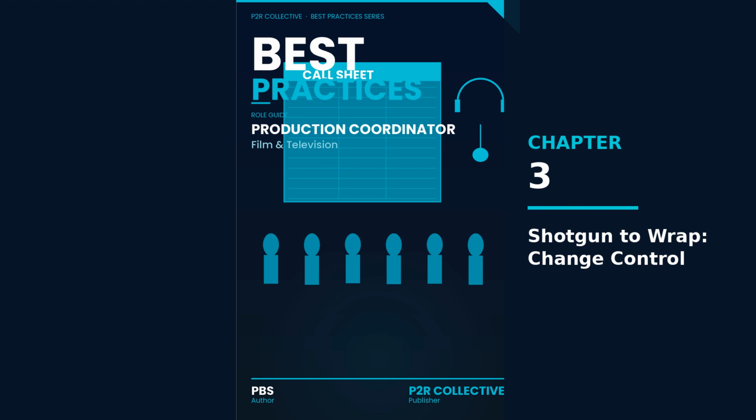3. Confirm the affected items before you publish. For each change, check the specific areas it touches: call times and crew arrival windows, location windows and access times, talent availability, craft schedules, wardrobe, hair/makeup, props, camera, shot list status rules. What counts as done today? Why this matters: the same change can hit multiple systems. If you only update call times, you can still wreck the shot tracking.